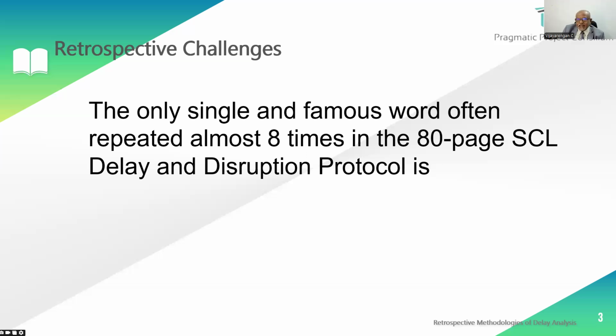Now, second thing, as far as attributability is concerned, he needs to work back and see there are possibilities of concurrency. Both the parties are involved, there are reasons behind that, and therefore the delay responsibility and attributability goes to both the parties. This is called concurrency. Whereas there are a lot of other reasons, this can go compensable or non-compensable.